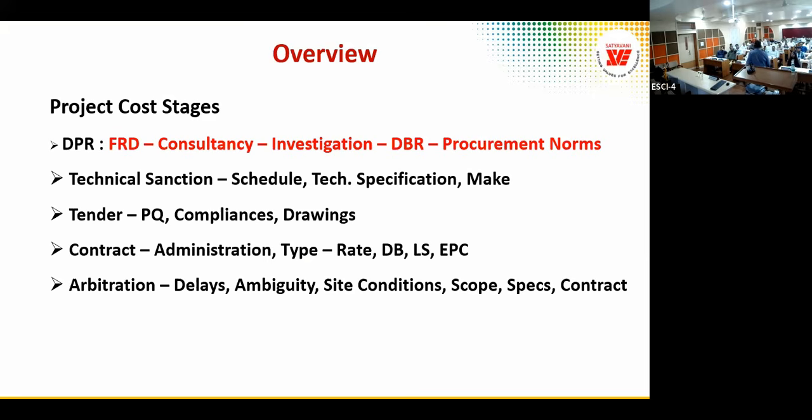That means if you pay a mobilization advance of 10%, it will be absorbed by the bank if current networth is negative. Yes. So I have introduced this clause in the pre-qualification: current networth to be positive.